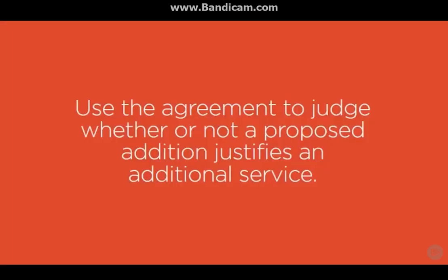It's a good idea to use the agreement to judge whether or not a proposed addition justifies an additional service. There are certain changes to the project that fall within the scope of contracted services, but in some cases our agreements allow for additional services that either expand the scope in terms of budget or schedule.